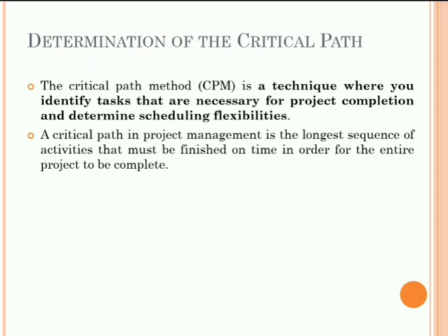Use a work breakdown structure to list all the project activities or tasks that are required to produce a deliverable. The list of activities in the work breakdown structure serves as the foundation for the rest of the CPM. That is why it is important to list the different activities in a project for creating the critical path method.